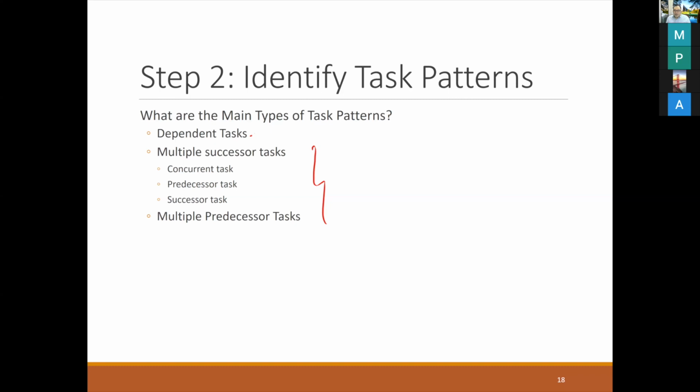Second task is drawing DFD. You can see that drawing of the DFD cannot be done if you haven't finished interviewing your users yet. So that means task 2, that is drawing DFD, must be done after task 1, that is interviewing, finishes. That is the predecessor task, and the successor task is the task that follows another task. So predecessor and successors go together. That means the interviewing task has a successor task, that is drawing DFD, okay.